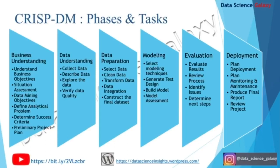Success criteria is about taking the model-based solution, translating it into business insights, and converting those insights into business impact for the client to realize the intended outcomes — in this example, a 10% increase on a baseline of 10 million dollars per annum. As part of business understanding, we also look at requirements, inventory of resources, assumptions, constraints, challenges, risks, contingencies, and cost-benefit analysis — all leading to creating a project plan governing the entire data science project lifecycle.